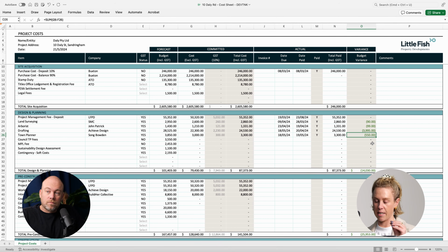Yeah, exactly. And it gives you that target. We always joke in the projects team, you'll have your target or your budget, take 10% off that and just start seeing that number, and you should always target that number and hope that you land somewhere in between. I think consultants, and this is probably just from my learnings, are harder to negotiate with than contractors. With contractors, you have a bit of pull with builders and demolition contractors, but I do find consultants harder. In saying that, our fees that we get are pretty tight in comparison to the industry.